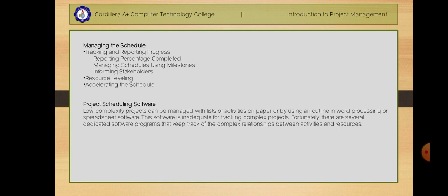Periodic reporting on the progress of the project provides the project management team with information on how the project is performing against expectations, and of course, to make decisions and corrections. Accurate measurement of schedule performance requires planning during the early stage of the project to determine the unit of measure and the process for tracking progress.